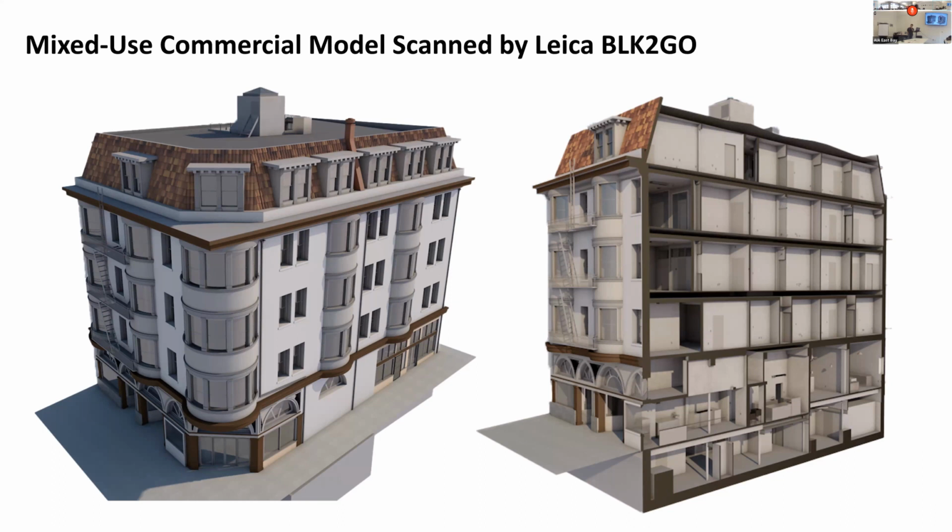Are we talking about time duration or actual weeks of turnaround? Actual weeks. What are the hours in the field? So let's go with a two-story, 2,000 square foot Berkeley house, remodel package, floor, roof, and exterior elevations. It depends on the surveyor, but I would ballpark it anywhere between 2 to 4 hours on site.